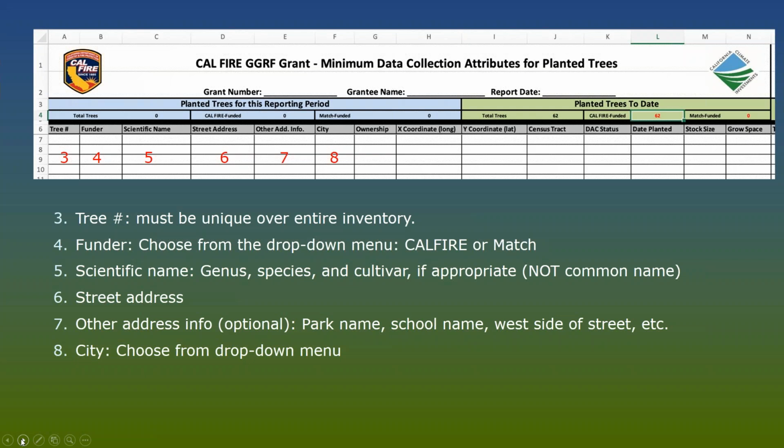And this allows us to have a conversation in the future where I say, hey, tree number 476E does not have a species. Can you tell me which one it is? And what's happening a lot is people are renumbering them every quarter, or just numbering them 1 through 25 every quarter. And then if I say tree number 23, you don't know which quarter we're talking about. So I'm going to be pretty strict about this in the future because it's caused so many problems.